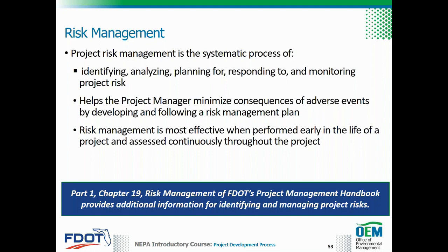Risk management is most effective when performed early in the life of a project and assessed continuously throughout the project, during ETDM screening events and SWOT kickoff meetings. When a formal risk analysis is performed for the project, its outcome is documented in a risk register.